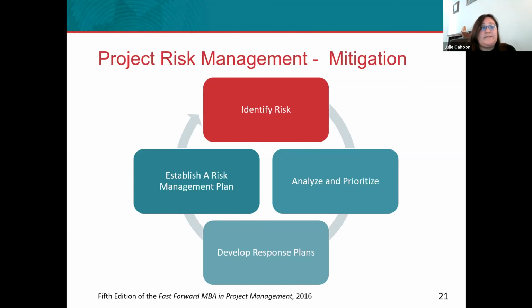A cost risk is a result of misestimated project costs and also scope creep. A schedule risk example is the result of activities taking longer than expected. And performance risk or quality risk is the result of producing products, services, or activities that do not meet requirements.